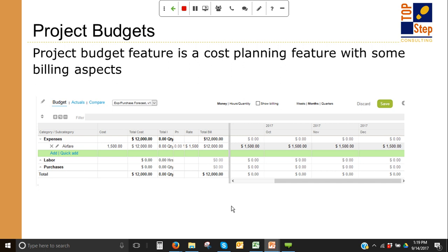So what I like to use this for is, if you're not going to do cost planning, I like to use it for a forecast or like a revenue plan or a burn plan of things. And when you set it up, you basically set it up to say, I have $50,000 of labor and I have $15,000 of expenses, and I just spread it across the timeline that I expect to burn it. And this is more like a spreadsheet grid that, some of you who may have been project managers may have had this kind of spreadsheet in the past. And it actually is nice to do it in the OpenAir system now for, I would think, primarily for larger projects actually, just because there's time to set it up.